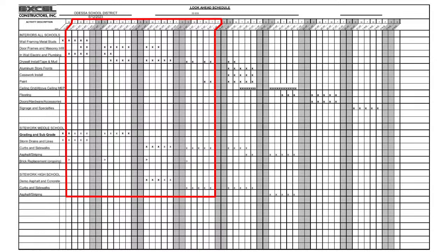They're framing out with metal studs. I know you all walked through the school, so you probably saw that. Spaces are taking shape. In conjunction with that, they're putting in electrical and plumbing while the walls are open. In-ground plumbing for any fixtures that need to be put in. Like just down the hallway, they had to run a plumbing line across the hall. That's in and filled in. And then so that'll take place through this week into next week.